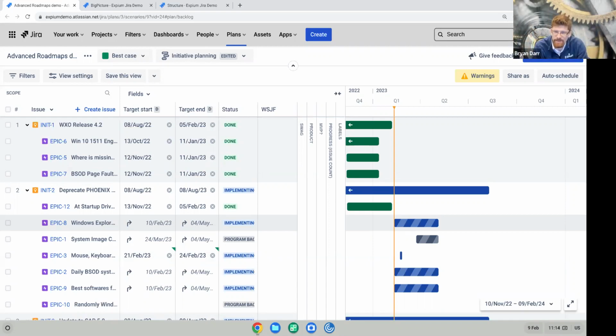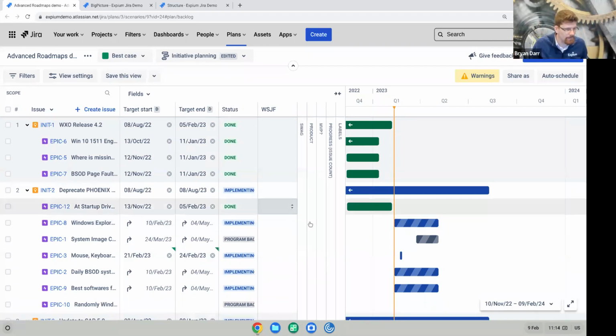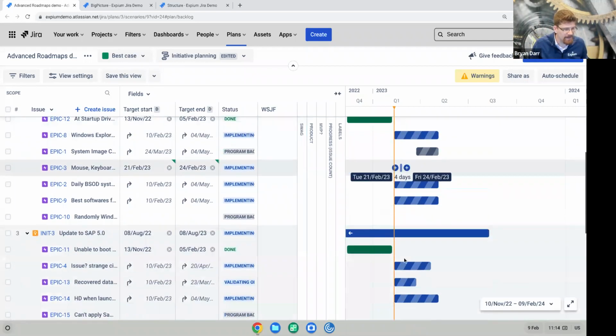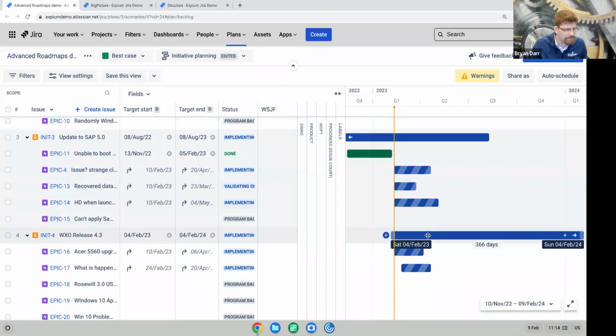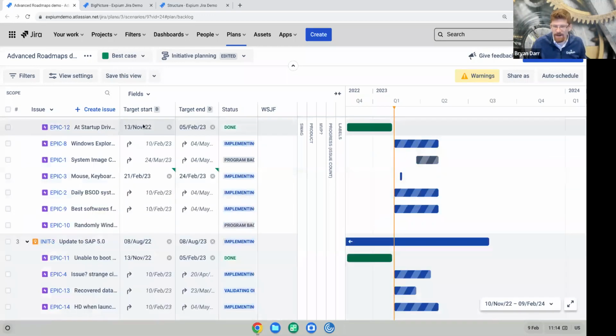Dependencies. Dependency behavior is what I would call soft dependencies, and it is done by Jira linking. So updating an issue's dates will not update its dependents. This is a really important key. This is one reason it's not a Gantt chart. If I set an antecedent's dates, it will not push out the successor's dates. So, for example, let's see if I have an example down here. No, I actually don't, but that's okay.